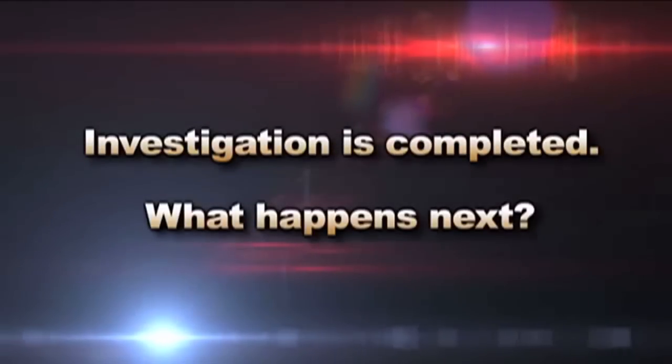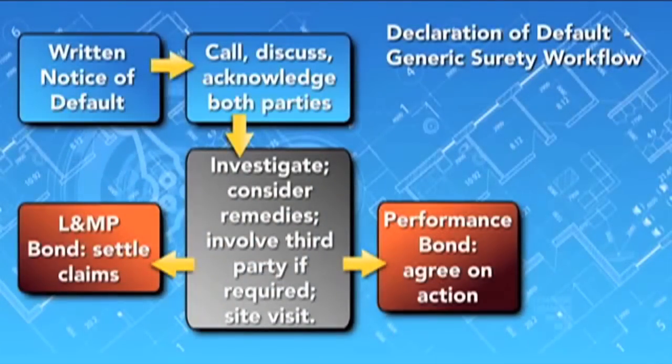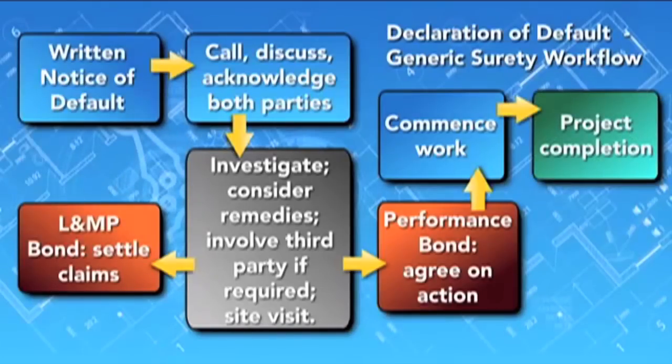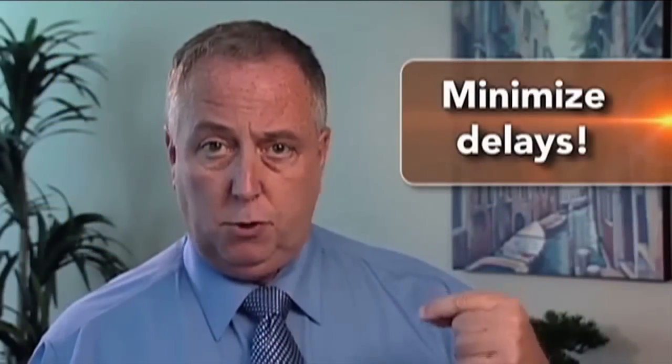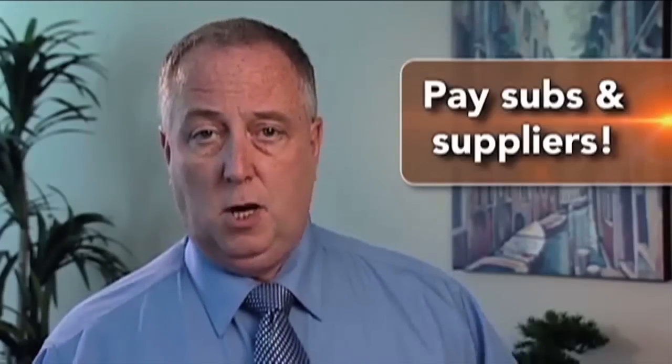Once the investigation is completed, if the surety concludes the contractor is in fact in default, they kick it into high gear. The first thing they'll do is make sure the work is protected from any damage or deterioration. Then they'll work with you to map out the best method for bringing the half-completed job to a successful conclusion. They'll have two objectives: first, minimize delays and make sure work can proceed as expeditiously as possible without interruptions, because interruptions can be both costly and frustrating. Second, make sure all labour and material payment bond claims are paid promptly, ensuring subcontractors and suppliers stay on the job and the construction team remains intact.